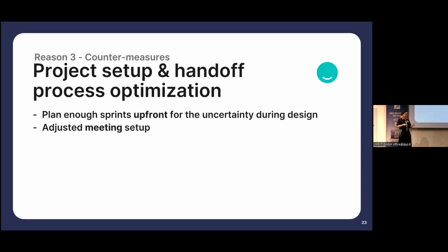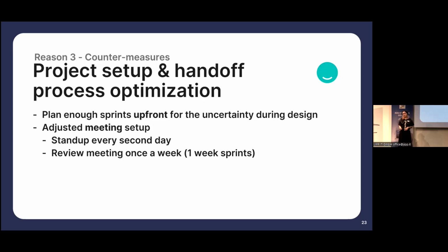I love how in Agile you can turn a framework like Scrum into whatever you need. And I'm just going to show you what worked for us. I mentioned before our 2-week sprint. This is something that we completely abandoned. We said we would do a stand-up every second day, not every day. If a project is critical, you can do it every day, but our designers didn't need it, so we put it to every second day.